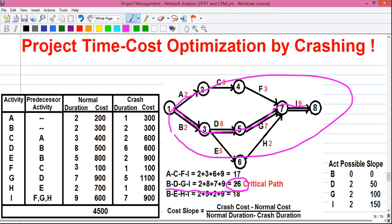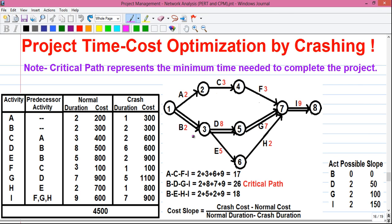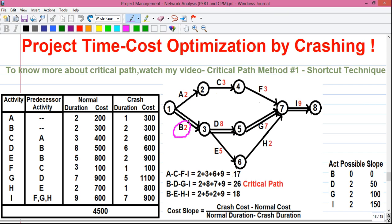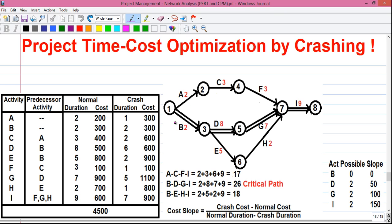We will check whether we can reduce the time duration with the least possible increase in project cost. Project duration depends on the critical path — on the duration of critical activities. So to reduce project duration, we reduce the individual time for each critical activity: B, D, G, and I. To determine which critical activity to reduce first, we find the cost slope value for each critical activity using a simple formula.